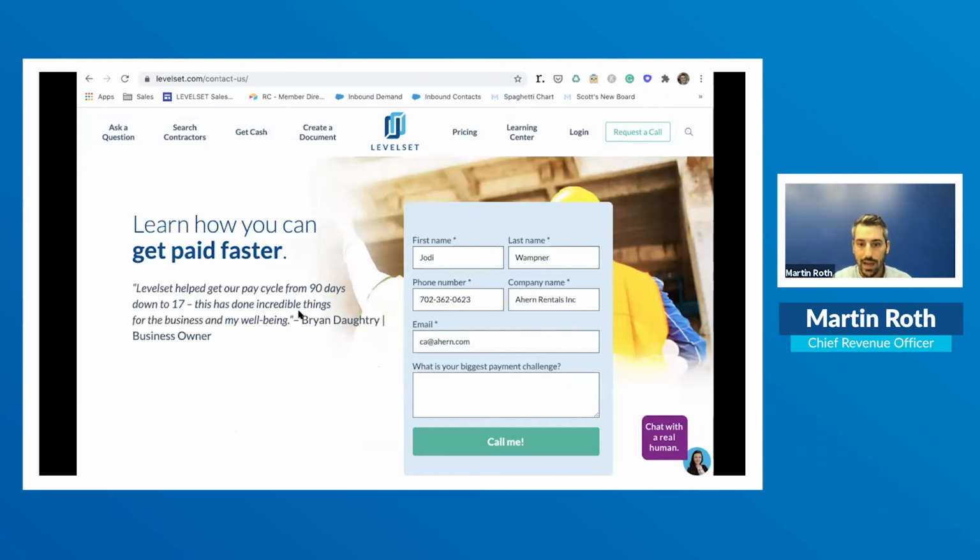Another question, do we have lien rights if we haven't filed a preliminary notice? So again, I can't give legal advice. I can't tell you whether or not you have lien rights. It usually depends on whether or not a preliminary notice is required in the state. Usually if a preliminary notice, or an NTO, they have a bunch of different names for these, is required and the notice is not sent, that is usually fatal to the lien right for that particular project and for that contractor or supplier.